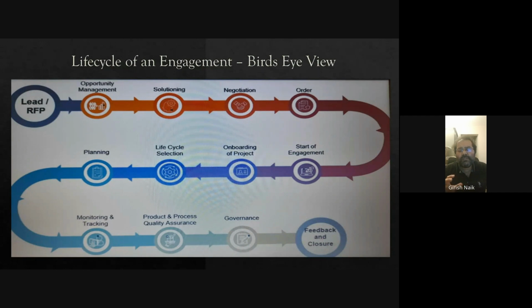Once they do the audit, they will log the non-compliance against that project. Then for the non-compliance, an RCA is done. Then the problem will be fixed with the corrective action and preventive action. Then the project will continue, right? So basically, these audits will be happening very periodically, so that the problems are unearthed and fixed, which should not affect the customer satisfaction, right? That's what we do.